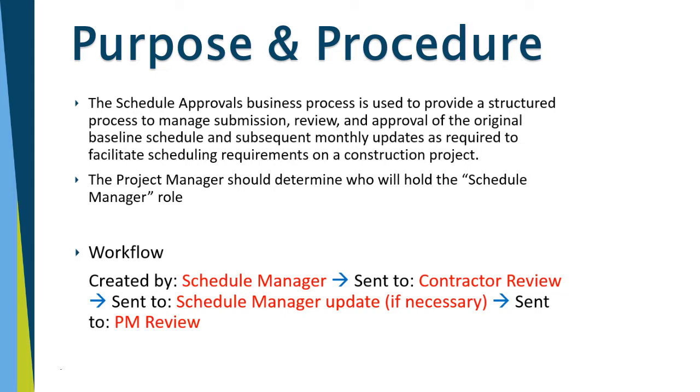The project manager should determine who will hold the schedule manager role. For the workflow, it's created by the schedule manager, sent to the contractor for review. It can be sent back to the schedule manager for update if necessary, and then it's sent to the project manager for review.